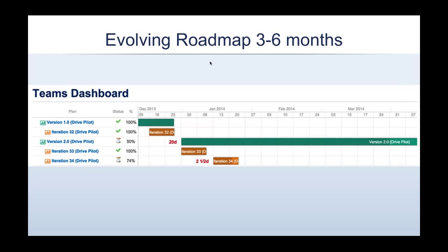It is a good practice to keep this roadmap focused on shorter-term tactics, like about 3 to 6 months. And on the long term, you should only write goals. Please notice this difference between tactics and goals. Anything beyond the planning horizon may be unrealistic given the rate of changes in the business environment, and that's why the roadmap needs to be updated as needed. Every stakeholder needs to have visibility of the latest version of this roadmap, so it's a good practice to publish it in your ALM tool.